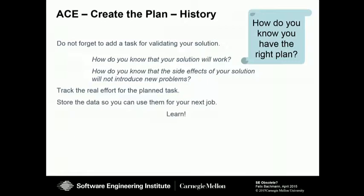And there is a reason why project managers put buffers in there. Because they know it is very normal that unexpected things will happen. And therefore you need to have that 20% buffer in there. Overall, the average works just fine. Where does the 20% come from?